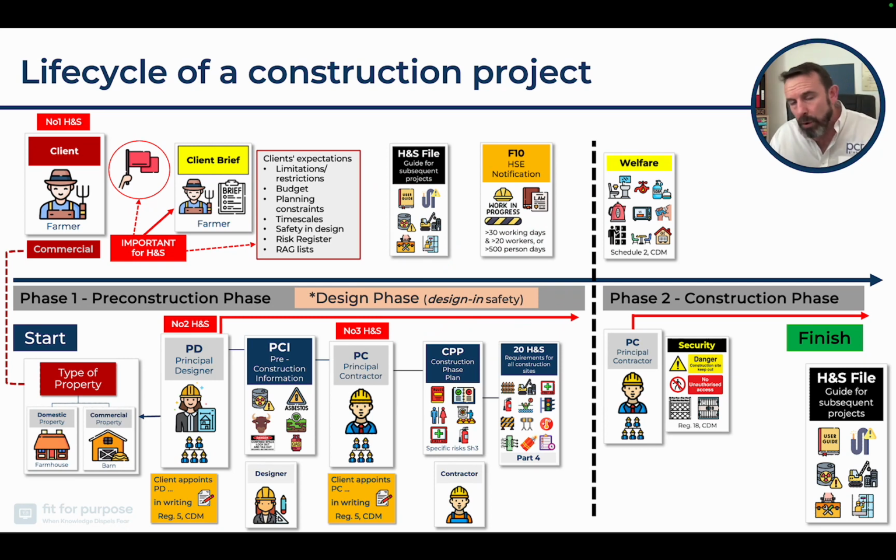We will cover it more in a further module, but we can see the health and safety file actually goes on further than the actual finish time of the project, because contained within it are going to be guides for any subsequent projects. The health and safety file, as required by the CDM regs, is only required when there is more than one contractor. I think that's important, because when there is more than one, we're going to need those appointments, because somebody must take control and have accountability for bringing all the information together.